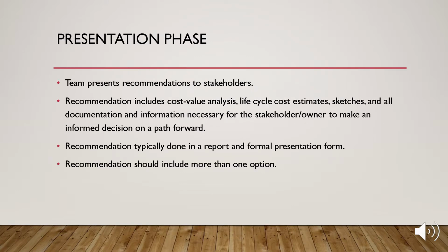Now, once you've completed the development phase, you can move on to the presentation phase. In the presentation phase, the team presents recommendations to the stakeholders. The recommendations usually include cost-value analysis, the life cycle cost estimates, sketches, all the documentation and information necessary for the stakeholder to make an informed decision on a path forward. Now, that usually includes a report and a formal presentation. And it should include more than one option again. This is not for you to decide, this is for the stakeholder to decide, and you have to present them with the best options from the value engineering process.